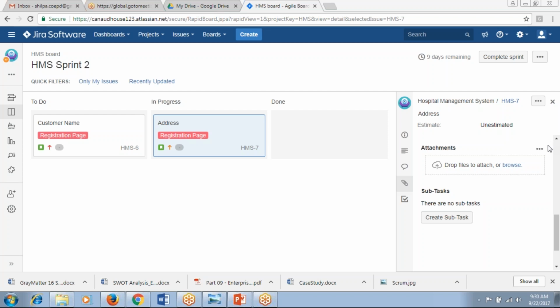And the third question is, whenever a change request comes, we have to do a feasibility study, impact analysis, and effort estimation. How do we capture it here in the Jira tool? See, for a change request, as I said, you follow the same thing again. When new change requests come, you create an Epic and then break it down in the form of user stories. There is no separate change tracker that you are going to maintain.